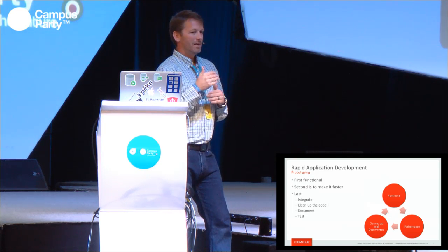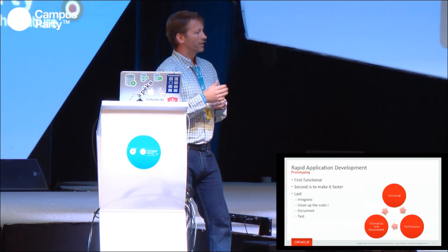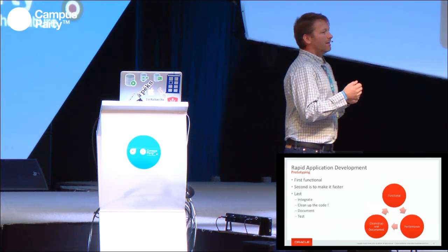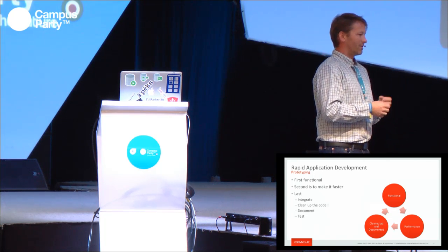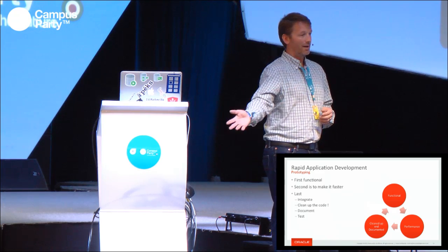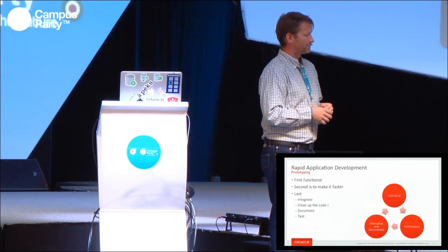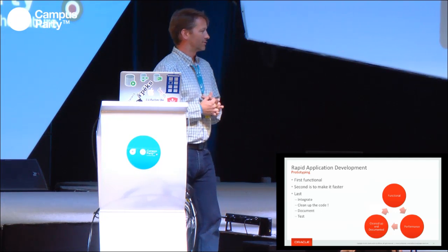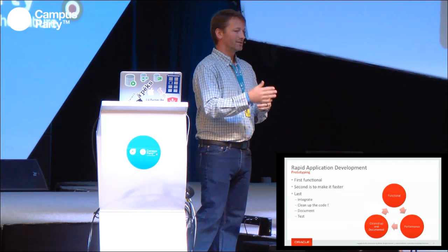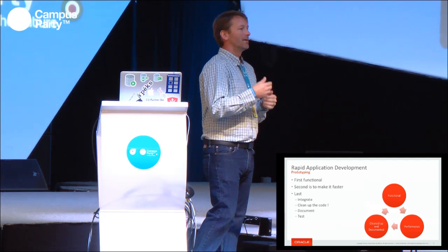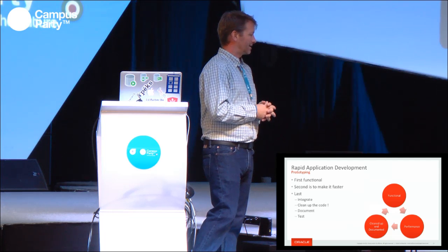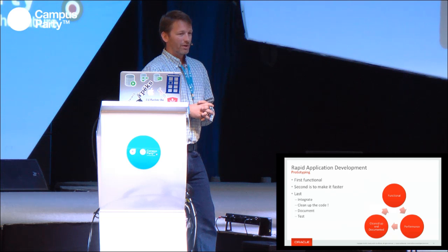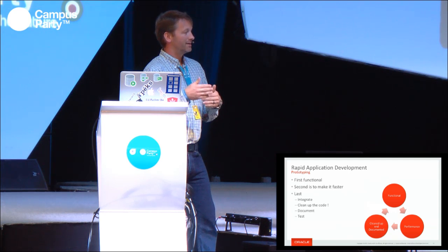So the first time we make the products functional, we agree with whoever the end user is what's going to happen there. We get the business flow correct, whether that be ordering something or compiling code, writing the compiler itself. The second iteration of this is usually where we speed it up. So the first time, you're not so concerned with speed, performance, things like that. The second time is where you start bringing the performance impact in. And then the third iteration is typically where we get the production quality code that we're going to end up deploying.